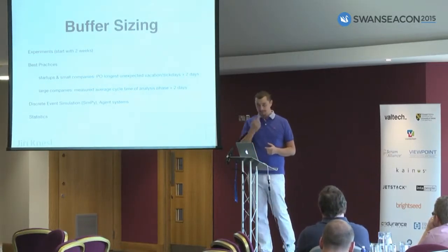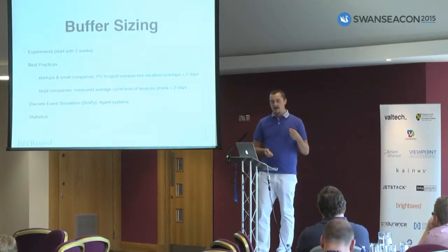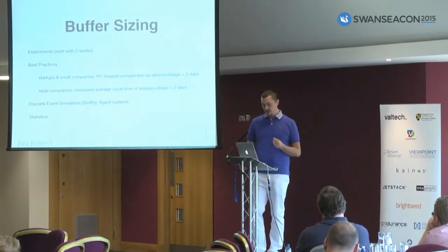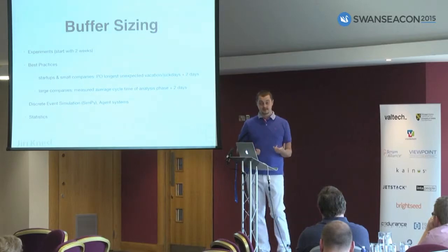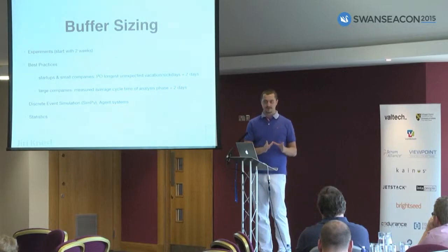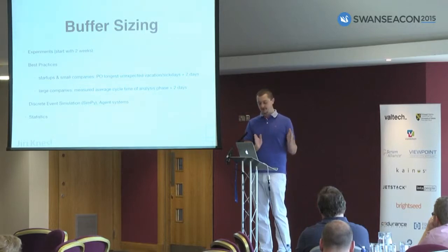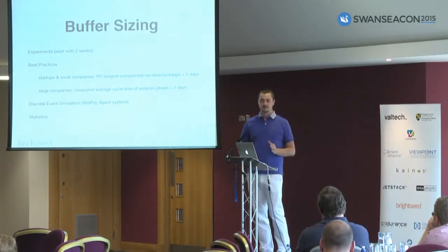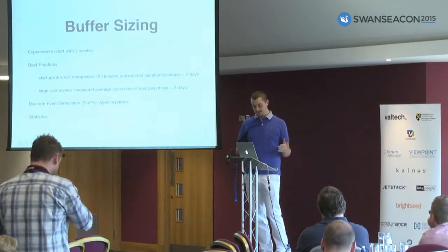In large companies, especially when those companies cooperate with other companies, third parties, and so on, I recognize that a lot of time is spent doing analysis, both technical analysis and business analysis, and it can take weeks. And you take the average cycle time of the analysis phase. Cycle time is the time to complete something of real work, plus 2 days. It's a best practice, so you can do this if you work in a large company.